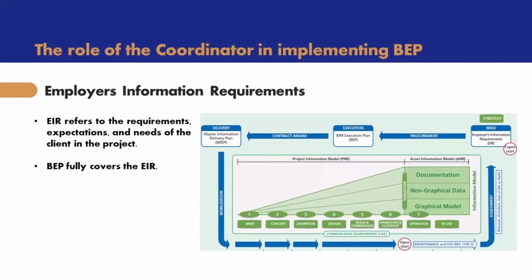When you receive information from a client, you're providing pre-BEP, which is called pre-contract BEP as well. Well, it is your answer to the client's needs. Well, if you decide to work together and move forward with that project, then you go to post-contract BEP, which includes many different chapters. Well, it is very comprehensive and complete, and the most extensive cases are discussed there.